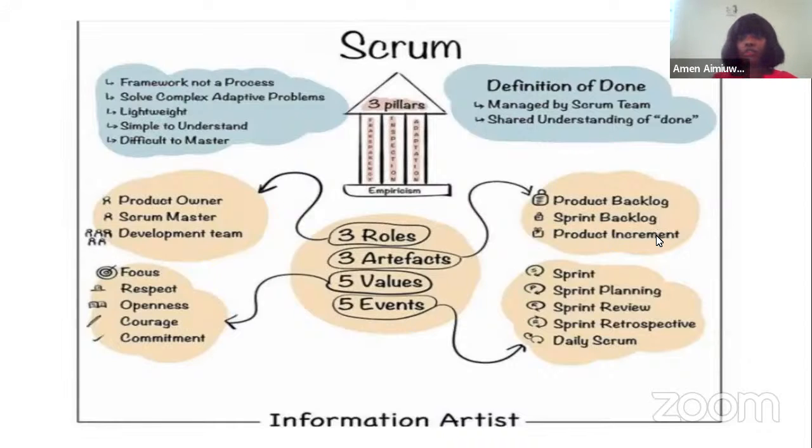Then we have the definition of done, which is a commitment for the product increment. We should also note that if a particular product backlog item does not meet the definition of done, it cannot be released as part of a product increment.